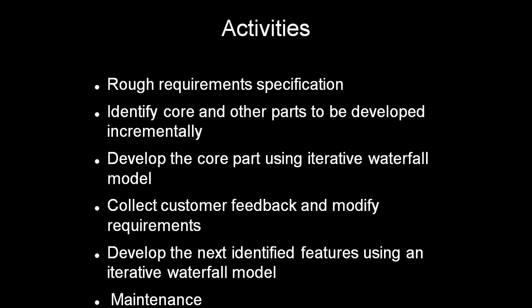So these are the activities we have already seen. Rough requirement specification, identify core and other parts to be developed, then develop the core part using iterative waterfall model, collect customer feedback and modify requirements, develop the next identified features using an iterative waterfall model, and finally the maintenance phase will be there. So we'll see the advantages of this model.